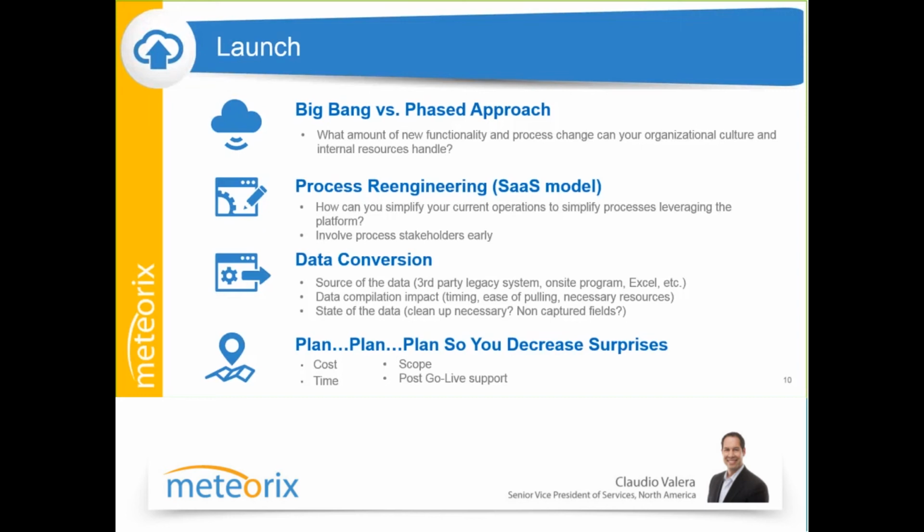Data conversion is a big part of these projects as well. So when you're launching the project, always start putting together a data strategy. Understand where your information is today, whether that's legacy systems, payroll systems, offline access databases, Excel, you name it. Think about the state of that data. Think about who actually has the skill set and the capability to extract and pull that data and scrub it as necessary so that we can effectively migrate that into the Workday system.